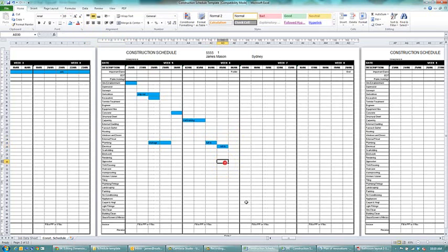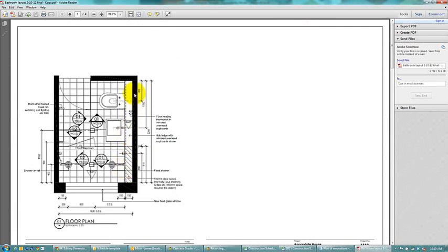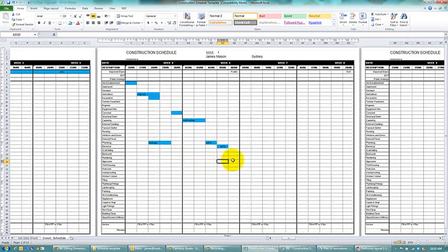Okay, so after we've had the plumbing and electrical roughed in, the next thing would be to probably sheet this wall here with some villa board. So we're going to get the gyprocker in to do that. Come across, and he's going to be there in a day we'll do that. Find the renderer, and we'll put him in for a day there as well. We'll just put him patching.